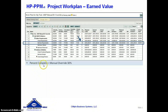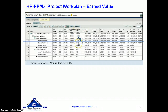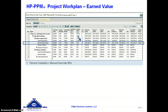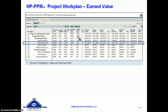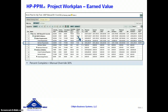The first field we're going to talk about is the percent complete field, which has been set at 30. We have actual hours to date of 75, and planned hours — which we'll assume is the baseline number — of 100, so that looks like it should be 75% complete. We've overridden that because we're testing the synchronization of Microsoft Project schedules outside of the HP PPM system in a full synchronization mode to see what the impact is of the manual override on percent complete to earned value and planned value in both systems.